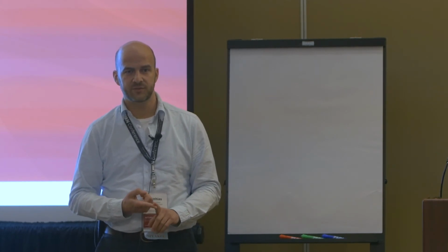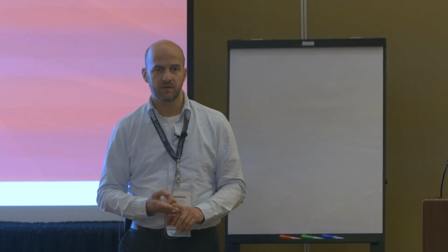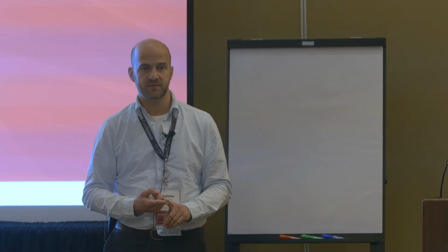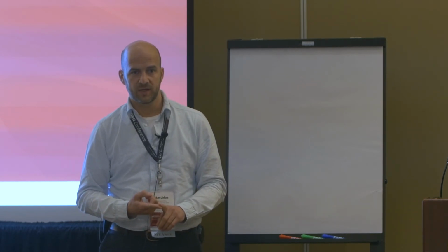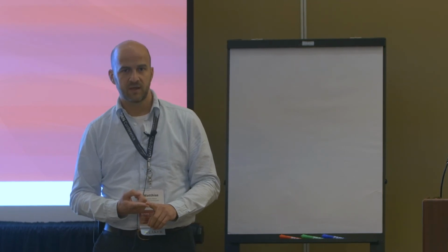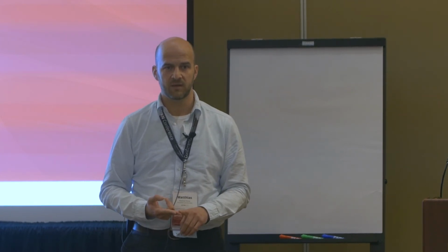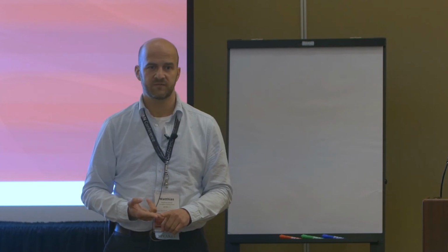Question number one. Everybody is invited to enter technical debt tickets, but an architecture team or an architecture board is requested to have a look at it, to decide is it really technical debt or is it something else, and are all the attributes, metrics, etc. set so that the ticket is of a high quality. Second, we use our ticket systems, which is in our case Jira, Redmine, and TFS.